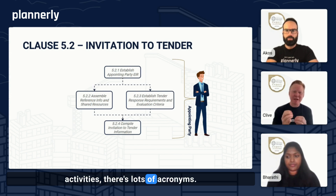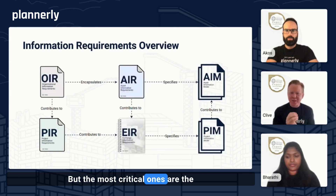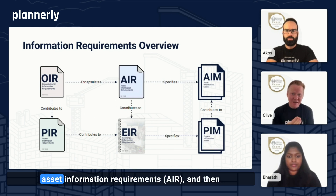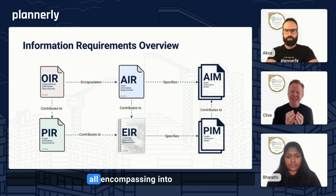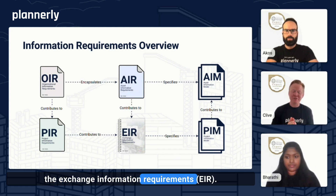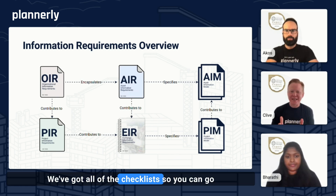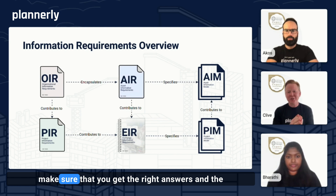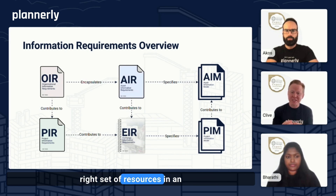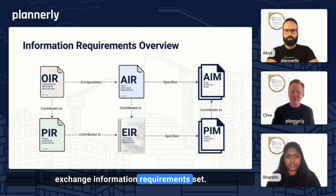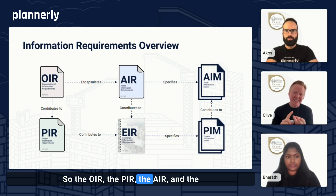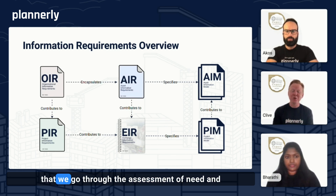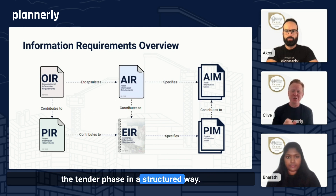Out of all of these activities, there are lots of acronyms, but the most critical ones are the organizational information requirements, the project requirements, the asset requirements, and then all encompassing into the exchange information requirements. It's a structured process. We've got all of the checklists so you can go through them and understand the right questions to ask to get the right answers and the right set of resources in an exchange information requirement set. So the OIR, PIR, AIR, and EIR form that set of documents that make sure we can go through the assessment of need and the tender phase in a structured way.